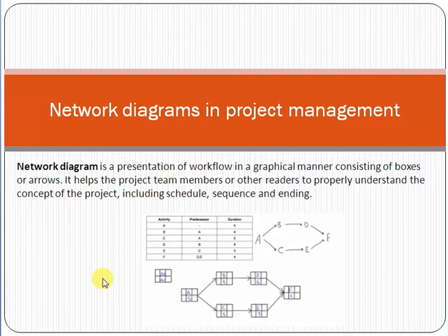First of all, from a project we have to decompose the project into smaller activities so that we can analyze the required work. Okay, for example, if you are making a mobile application, you have to think how much time is required for designing or making the wireframes, how much time is required to finalize the database, how much time is required to finalize the programming, how much time is required to finalize the middleware work, and then how much time is required for testing.